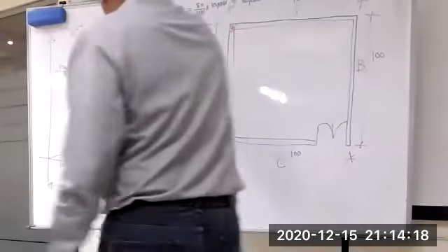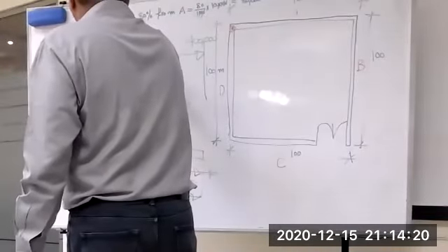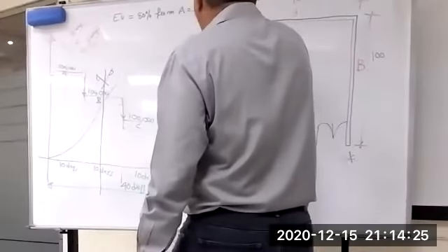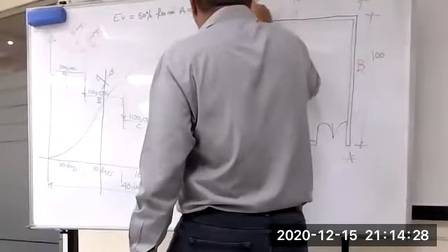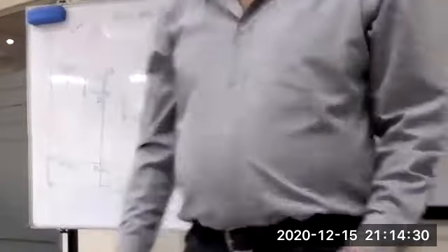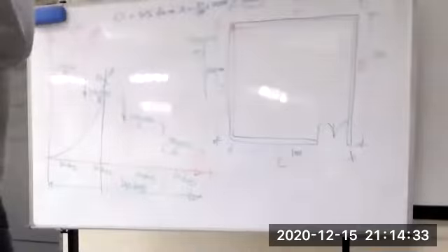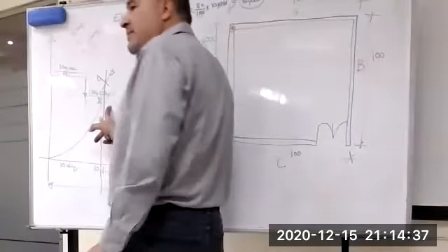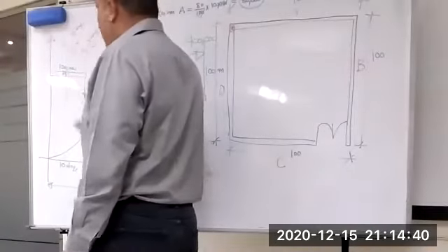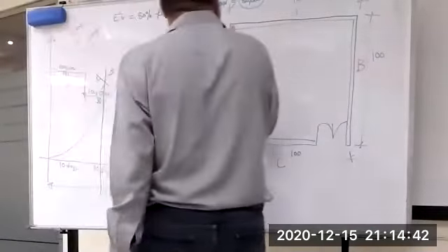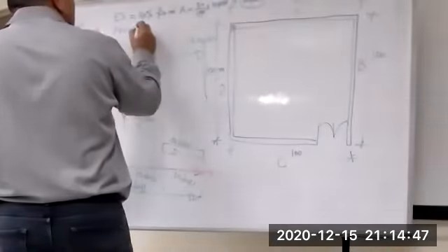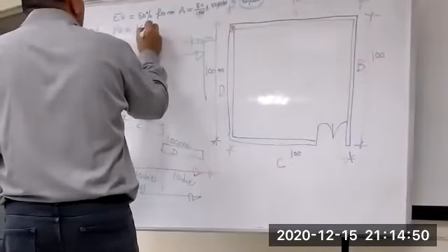Correct, guys? And so how much now? Your achievement, the earned value, equals what? Equal 80% from A. 80 over 100 multiplied by 100,000. That means your achievement is that. Now, what's your planned value in day number 15? I have 50%, so 150, because this is my plan. So your planned value equals 150.